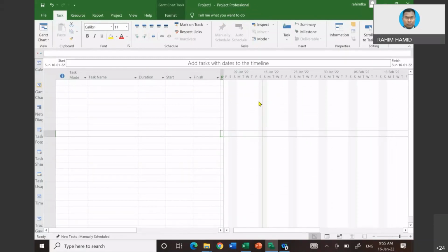So if, for instance, you decide your project is going to be working 6 days per week, let's say from Monday until Saturday, you need to change the working calendar accordingly. That is what I call setting up, the first thing that we must do before we even start.